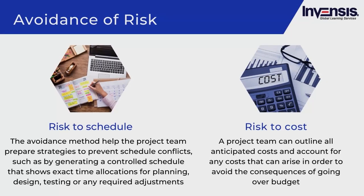For avoidance of schedule risk, by recognizing potential concerns that might impact the project's timing, it is possible to avoid schedule impacts. Important deadlines, due dates, and final delivery dates can be affected by risks such as being too optimistic about a project's duration. The avoidance method can help the project team prepare strategies, such as generating a controlled schedule showing exact time allocations for planning, design, testing, and retesting.